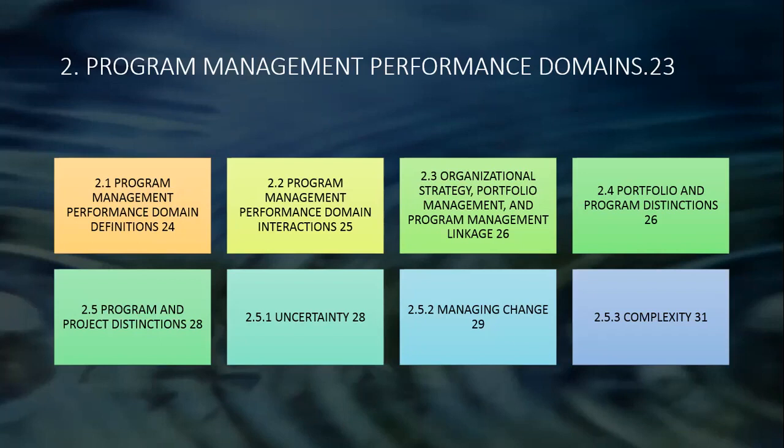So let's talk about relatedness. Relatedness is a primary consideration that differentiates programs and portfolios. And this is a concept introduced and implied by the word related in the definition of a program. In a program, the work included is interdependent, such that achieving the full intended benefits is dependent on the delivery of all the components in the scope of a program. In the portfolio, the work included is related in any way the portfolio owner chooses.